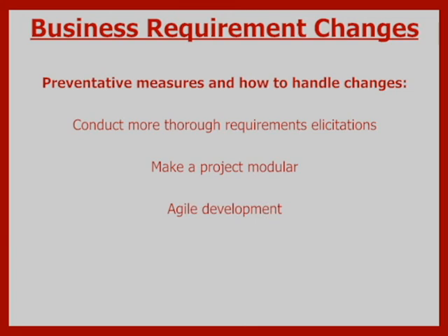This approach is the most effective because the prior two are still preventative, and despite best efforts, requirements will still change. This provides the leeway of adding new features with the offset of allowing programmers to decide which iteration they are going to implement it in. Regardless of how business requirements changes are handled, they need to be considered and handled to prevent projects going awry and becoming bloated and mismanaged.